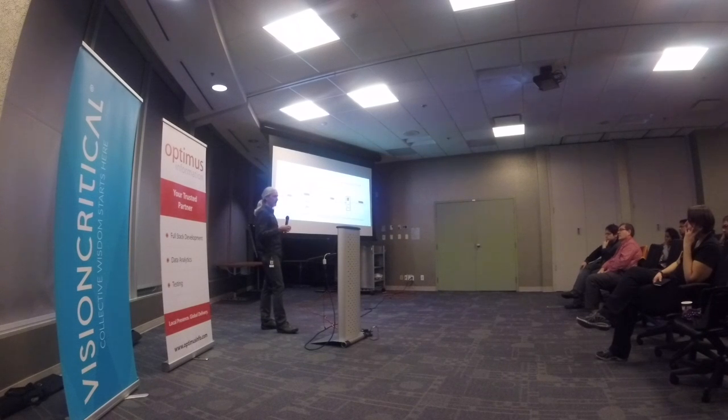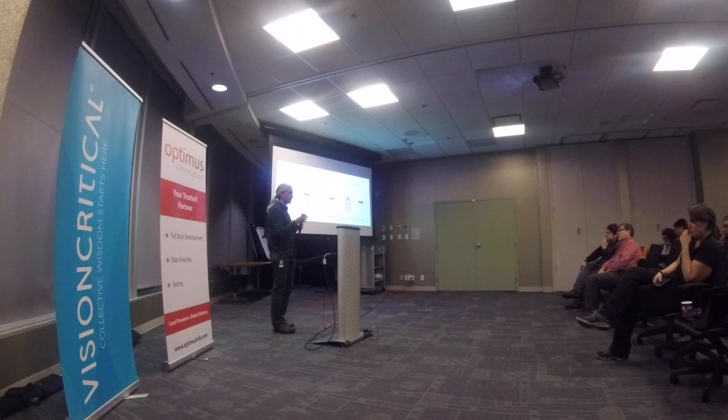What that really means is I'm choosing to spend more of my time talking about, thinking about, analyzing, challenging, questioning, and coming up with test cases around that. So if I've got a week to test this thing, or a week to think about testing this thing before I get the code and then have to test it, I'm going to spend the bulk of my time thinking about that and understanding that. Even if it's a short space of time for you, arguably it's even more important to focus your time. So I'm going to make that like 60% of my time spent on this project, whatever that 60% is, I'm going to focus on thinking about that.